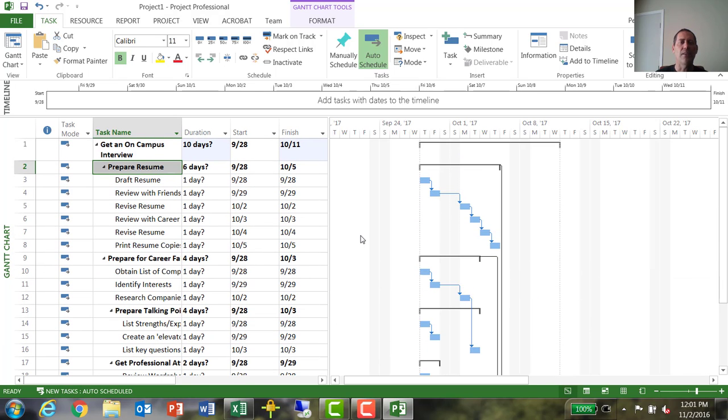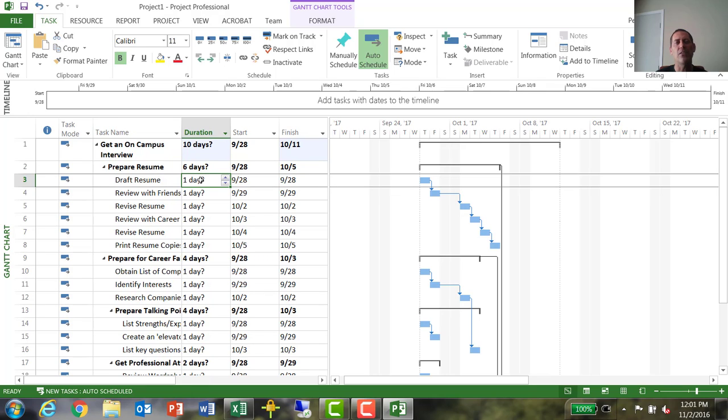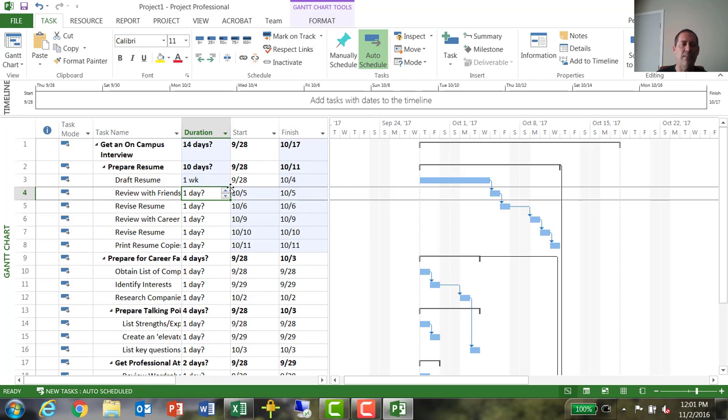All right, so now we need to enter some time durations. And these, you want to do your best guess of how much time it will actually take you to complete that task in real time. So not, if I sat down and concentrated, I could do this in 1 hour, but realistically, you're going to need to reach people, you're going to have meals, you're going to have classes. How much time will it take to draft a resume? So let's say that takes a week. I can do 1W, it recognizes that as a week.